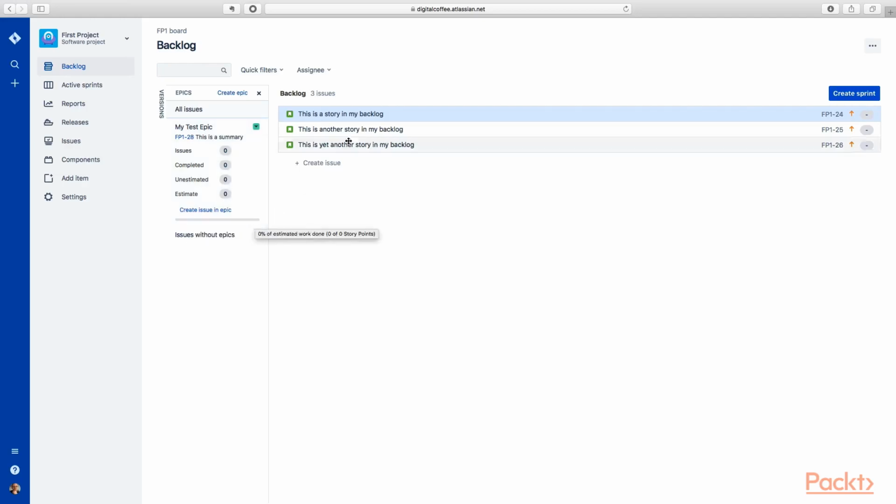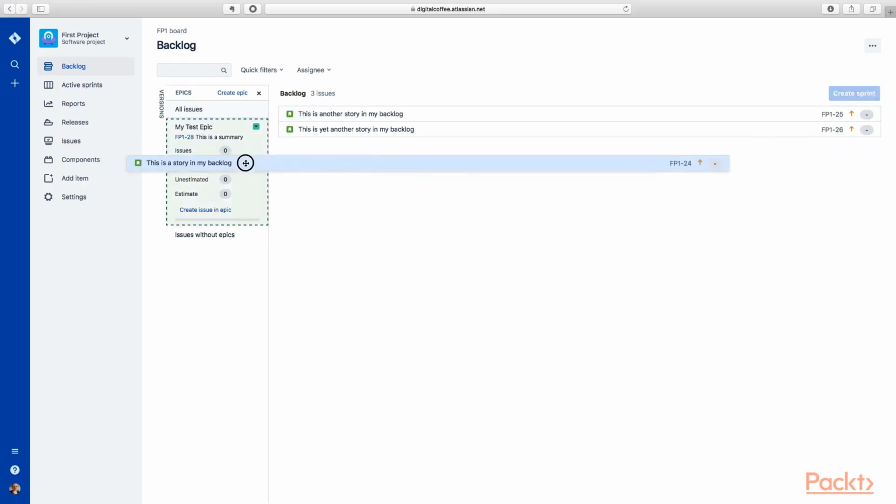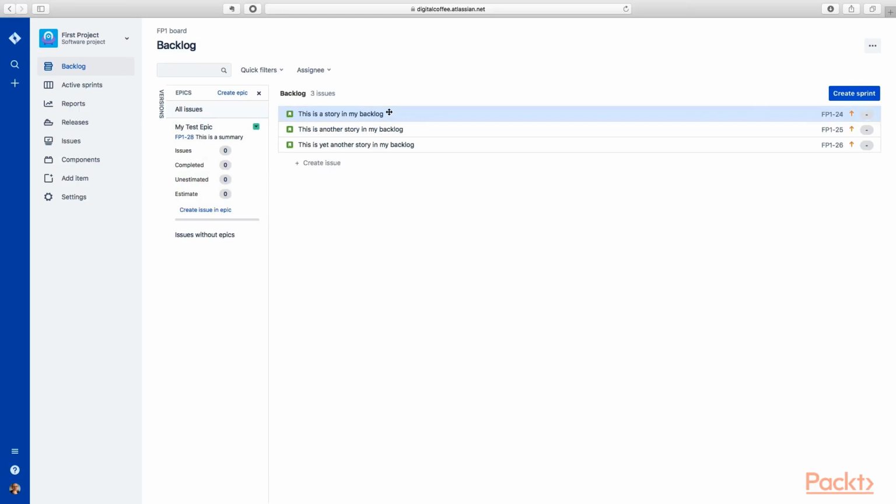So what you would do is create your backlog items, and then you would drag those into your epic. And that's how you assign them to that epic. And we'll look at that again in the future here. Just a reminder though, this epic is a story, right? It's a big story, but it's something that can be started and finished. It's important that this is not just a grouping. That's not the intent of this epic. An epic is a story.